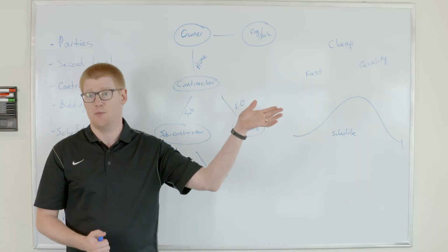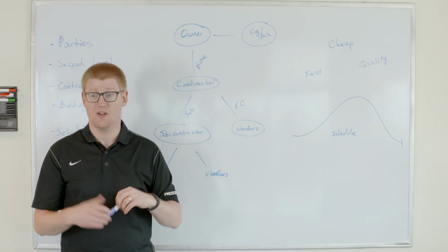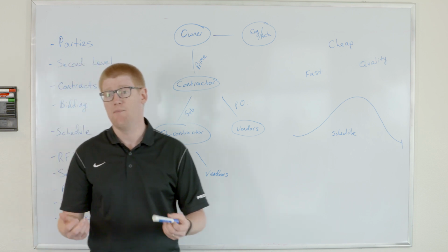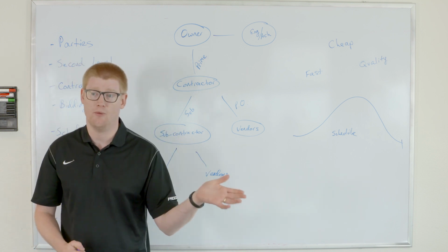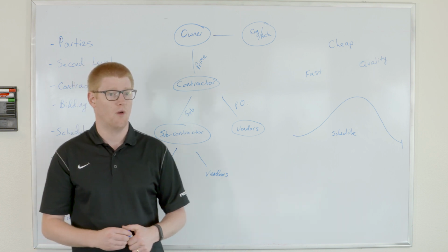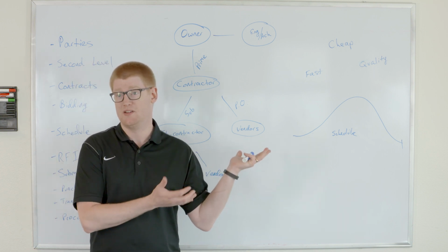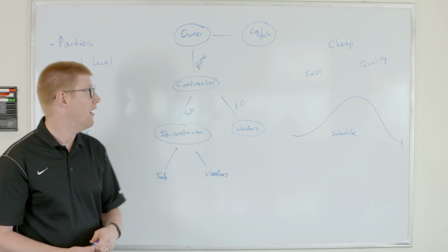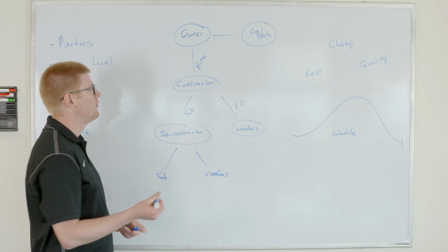If you had a steel beam that came in short, you could send it back and have them add on the extra steel, send you the correct beam, and they'd probably do it for free, but they're not going to pay for your crew that's going to stand around with nothing to do for 3 days. And so we really need to ask, can we just weld on a piece and go? As a contractor, you can't make that decision. You need an engineer to sign off on that. And so we have a request for information.